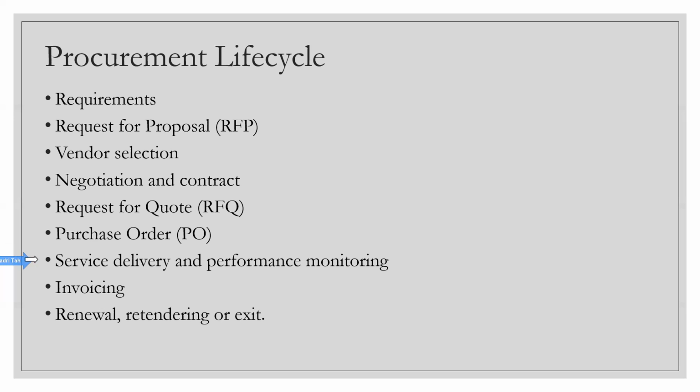Now, this entire process which I described has to be monitored, and a pattern has to be checked also. Are we always seeing a green pattern, like whatever is promised by the vendor, we are getting it, or are we always seeing a delay in the shipment or a delay in the arrival of the hardware? Then they have to dig in and find out whose problem it is. Can the problem be sorted if the vendor can ship it a little bit earlier? They have to check all this.